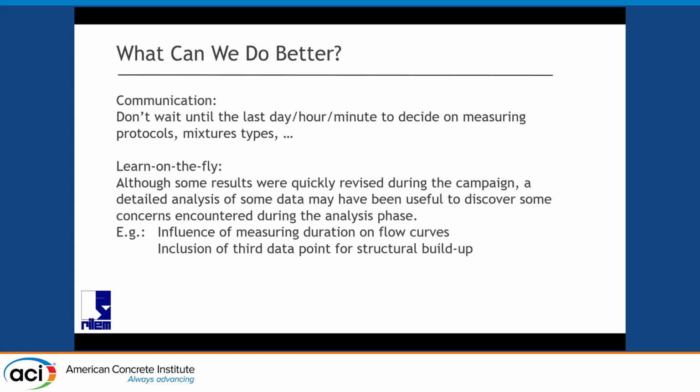Learn from them. Because there's a couple of things we saw, what Sufyan presented on one rheometer not being able to catch a peak during a static yield stress measurement, and that reduces the value of that device. We could have learned that and seen there's something we can change, like the measurement duration. That's extremely difficult because everybody's running around with everything going on. But a recommendation for the future is, if you have the time, pick some data out and look at it on the fly, the way we're supposed to analyze it, with everything prepared ahead of time, to be able to learn and adjust whatever we need to. Have a first mixture, try things out and go with the flow. That could be one of the bigger things for any crazy person wanting to organize this in the future.